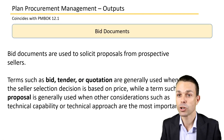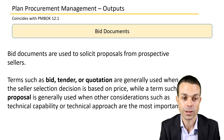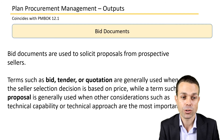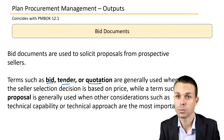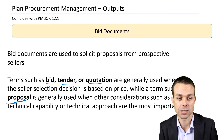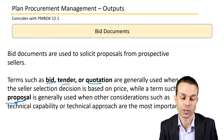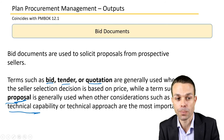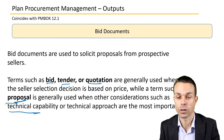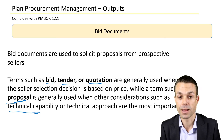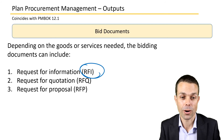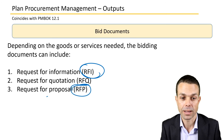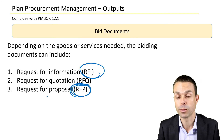Bid documents are used to solicit proposals from prospective sellers. Terms such as bid, tender, or quotation are generally used when the seller selection decision is based on price, while the term proposal is used when other considerations such as technical capability are primary. Bid documents include a request for information (RFI), a request for quotation (RFQ), or a request for proposal (RFP) — used when we're unsure if a seller can actually do the work and need a full proposal from them.